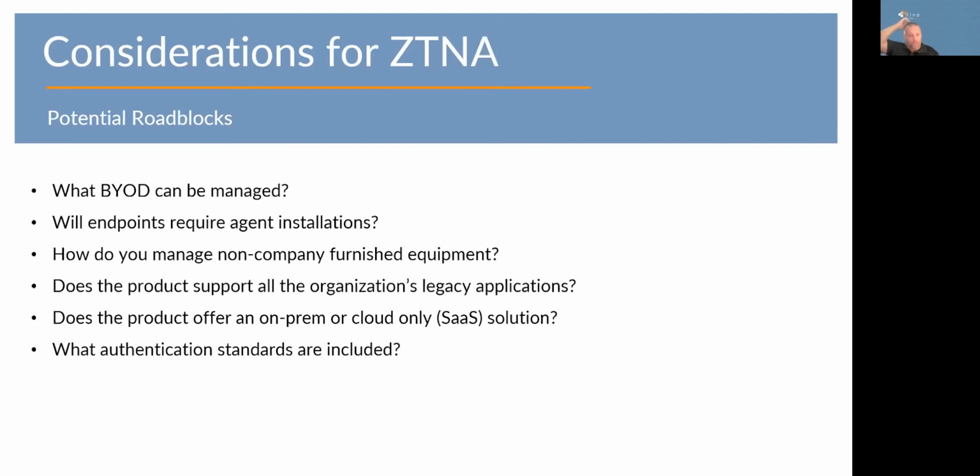If you get with a good vendor, obviously the vendor is going to ask these types of questions, maybe not all of them, but start the ball rolling. You ask questions and they're going to put together basically data sheets to say, if you're going to deploy our solution, here's what's going to be expected in your environment. You can get that in advance and you can go out and price that and see, is this feasible? Does it work? Can I afford it, et cetera? Because that is an additional cost.